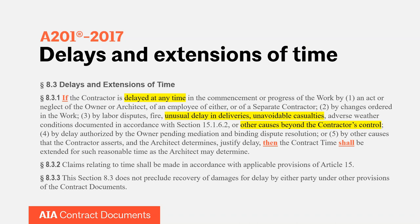An example of 'unusual delays in deliveries' would be Italian marble that's delayed. An 'unavoidable casualty' is a legally fancy term for an unavoidable accident outside the contractor's control. 'Other causes beyond the contractor's control' is a mini catch-all within subsection 3. Reading 8.3.1 with those triggers: 'If the contractor is delayed at any time in the commencement or progress of the work by unusual delays in deliveries, unavoidable casualties, or causes beyond the contractor's control, then the contract time shall be extended for such reasonable time as the architect may determine.'